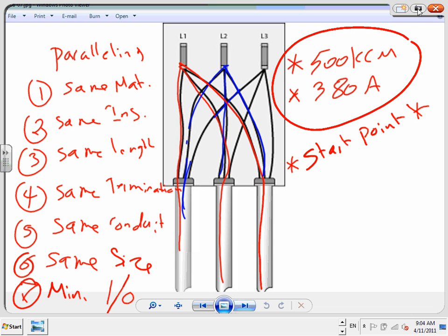We did a data center for Target stores, and a company walks in and tests every single thing after the electrical contractor finished the work. And then they give an operation manual for the owner, how things are going to work, and that things are working. So commissioning. Cool. I can't remember the name of the companies, but if you go commissioning, company commissioning, it's basically detailed inspection.